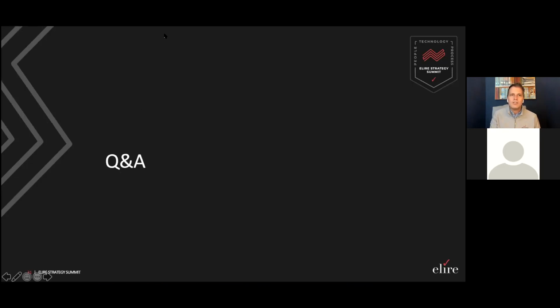So with that, we have just a couple of questions I see. So we have the, what are the risks of not having any steering committee? How often should they meet? I think it's very risky to not have a steering committee. You run the risk of not having stakeholder alignment, or maybe one stakeholder being aligned, but another not being aligned. And also you run the risk of not communicating if a project is going yellow or going red until too late. And then people wonder what's going on. So I think oversight of a steering committee is one of the most important things.